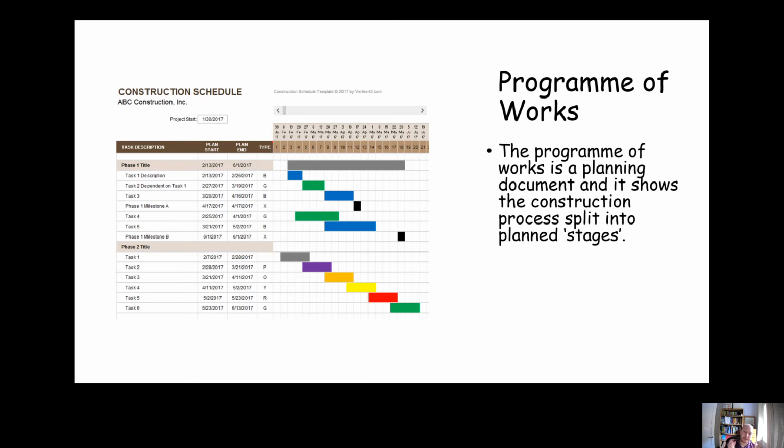That means you're not rushing forward with all of the woodwork at once, for example, before you've run all the pipes and cables, because if you start putting walls and floors in before that, you're just going to create an issue for other tradespeople. So essentially it splits the job into logical steps which the site manager would make sure that people follow.